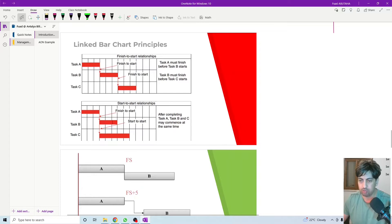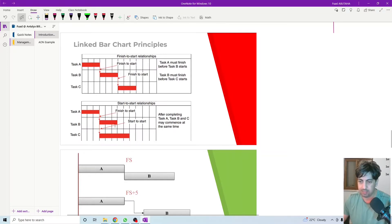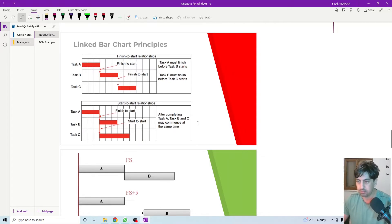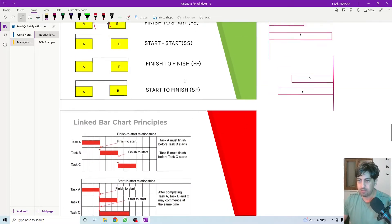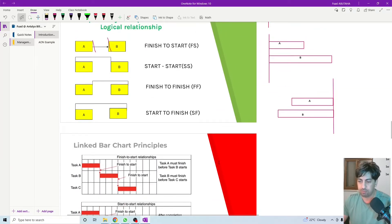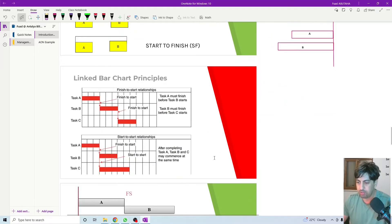Activity B needs three days to complete, and activity C needs five days to complete, but they are not linked from their finishing point. They are restricted to start at the same time. So this is, in general, the most commonly used types of relationship between activities.